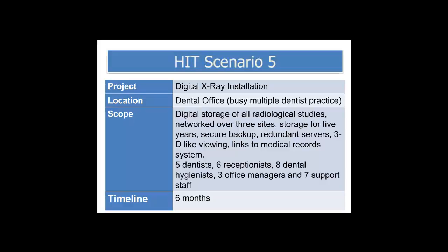The project manager role will be one of coordination. You have 3 separate offices that you're bringing together, so you'll need to make up your team from all of those offices, because in each office the workflow will be a little different just because of the layout of the office and how it's situated in the building. So you need to be sure that you look at all of those workflows so that you can come up with one overall that will fit all 3 offices.